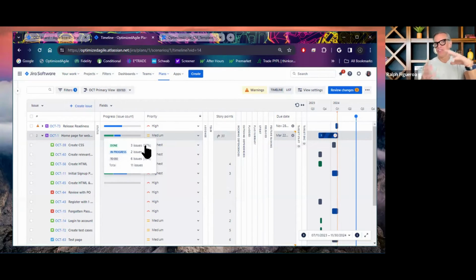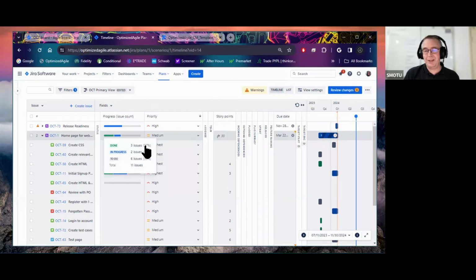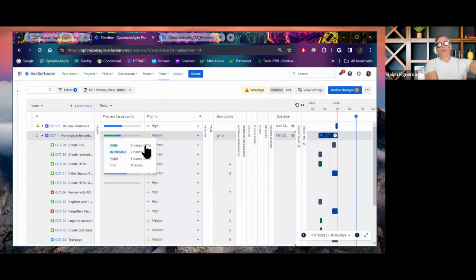If you mix everything from here to eternity, it would be 27% of all the work that you're planning to do into 2025, and not 27% for the actual release. Exactly. And the way you get around that is by carving out epics that are specific to the release, with the stories that are specific to that release in that discrete epic.